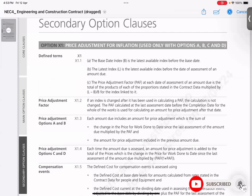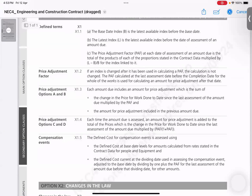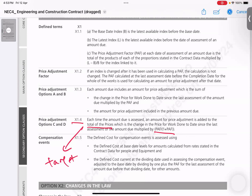This is secondary option clauses. Option X1 — we talk about price adjustment for inflation. The focus here will be X1.4. It applies to options C and D. You do realize there is a formula in there: PAF over 1 plus PAF. It tries to say that each time the amount is assessed, we need to adjust the total of the prices, which is the target.